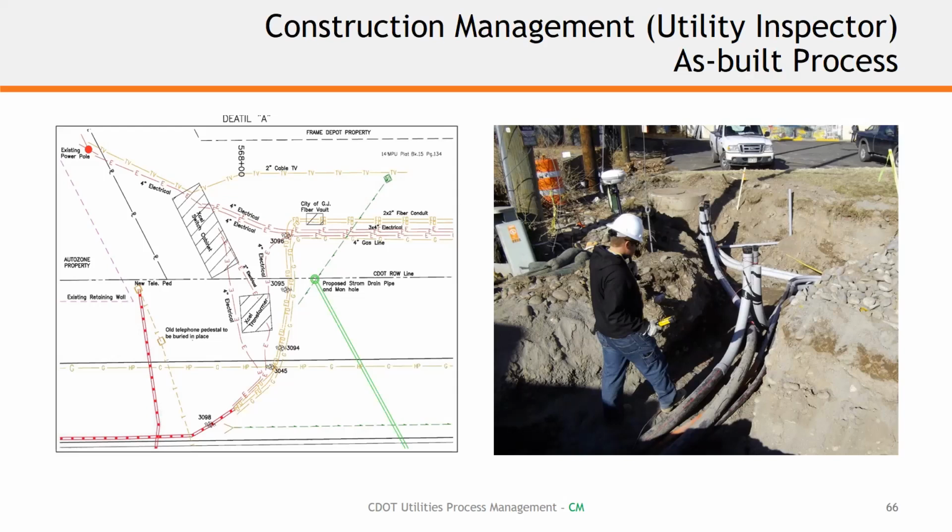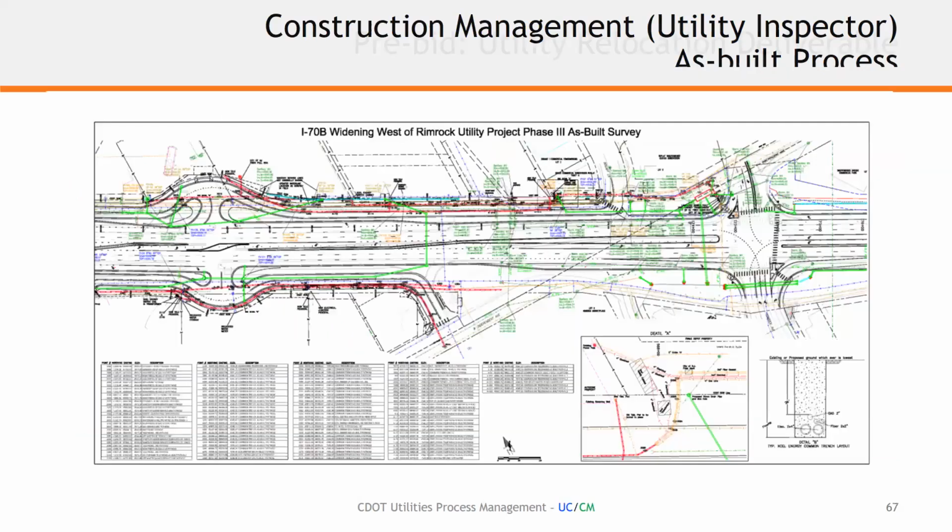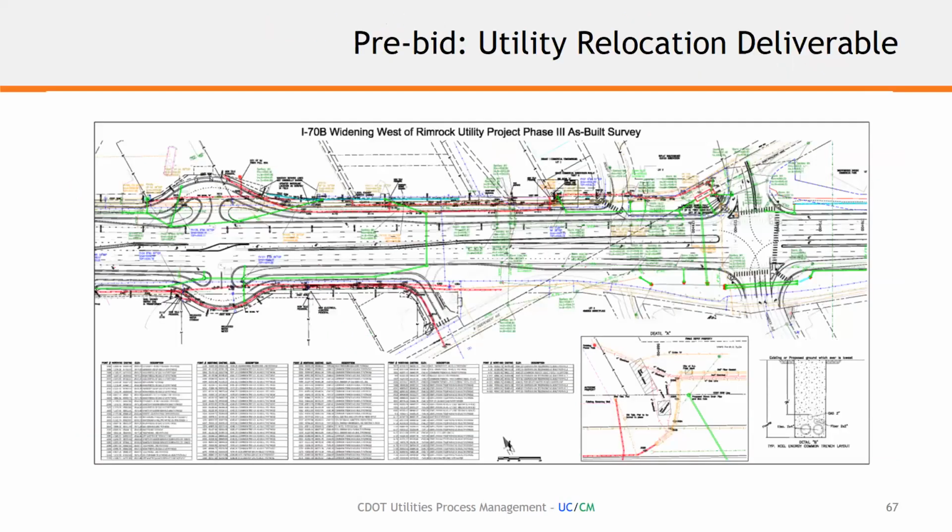This was an early relocation, so we were collecting all of this information while it was being installed. We didn't have a CDOT contractor on board yet, and again, we were trying to document the new situation that was going on out there. And ultimately, what that led to was a project-wide as-built drawing that had the ability to capture all that information throughout the entire project.